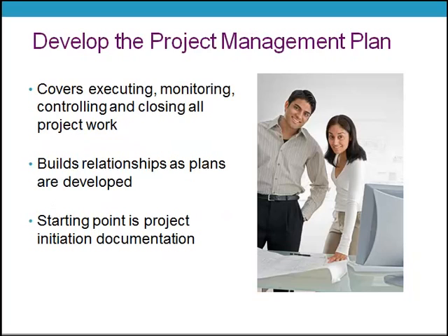The project management plan is the basis for executing, monitoring, controlling, and closing all project work. It is an approved formal document including plans for scope, budget, schedule, risk, staffing, quality, and others.